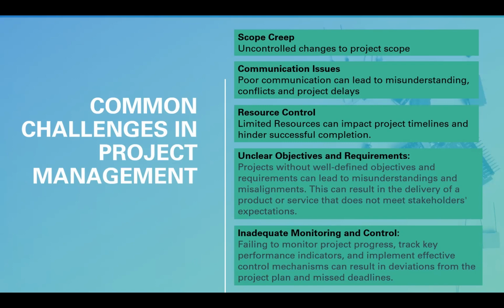Another thing is resource control. How do we control the resource? And resource, I said, includes persons, time, and money. For instance, if they have budgeted this amount of money and they said they are going to release funds in parts, and the first chunk of funds has been released, and you need the second chunk to continue, and the funds are not there, it will impact the project. Or if the human resources are not there, it will impact the project.